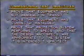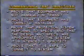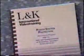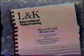prove that the equipment has been correctly installed, prove that the protection system performs according to specification, and that the design and specifications of the protection system are appropriate to the system it is intended to protect, and prove that it is safe to connect the new installation to the power system. A typical list of commissioning tasks for all equipment is included in your workbook. Take time to study this list in detail.